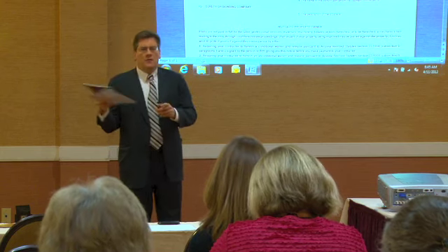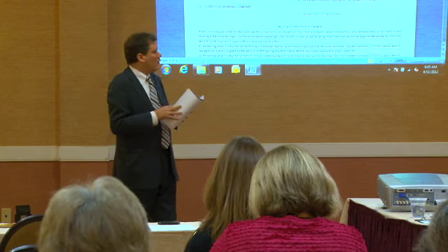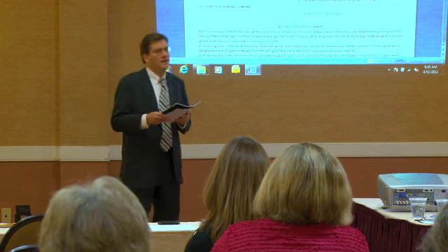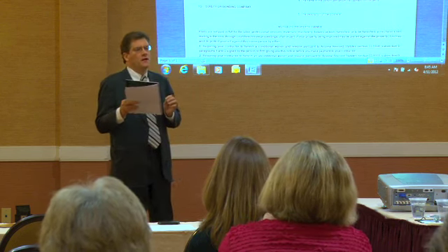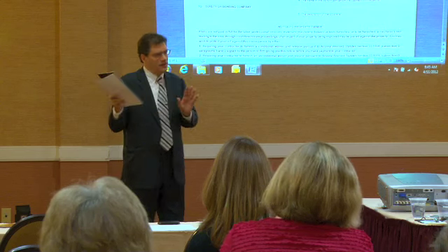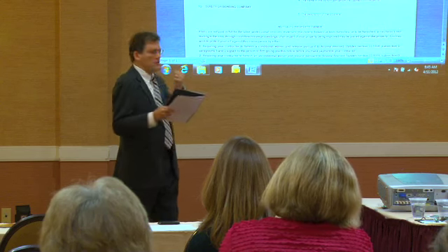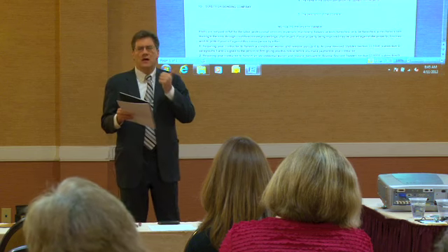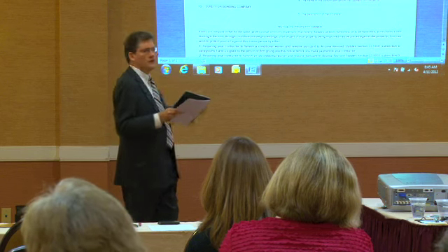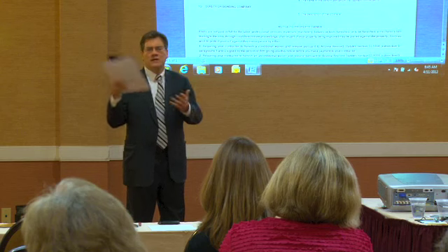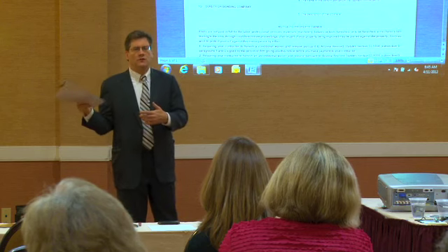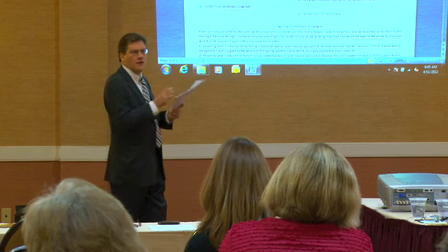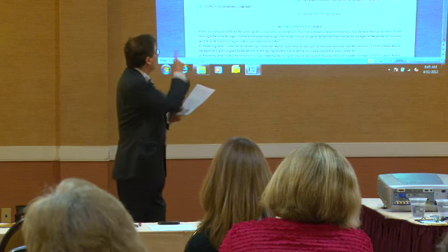In the second seminar this morning, we're going to be talking about payment bond rights and 90-day letters. 90-day letters are not elaborate documents. And a preliminary notice can satisfy the requirements of a 90-day letter, and sometimes you've got no choice but to rely on having sent a preliminary notice because you missed the 90-day deadline after your supply of materials or labor. So, if you've got the surety or bonding company on here, you've got a little bit of a safety net.